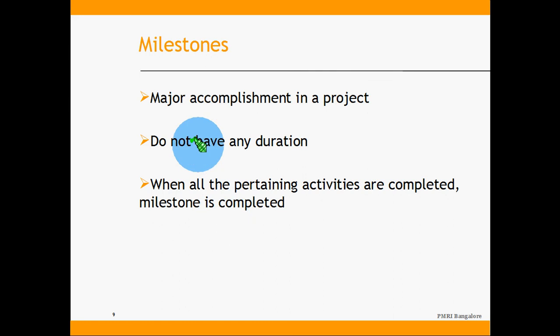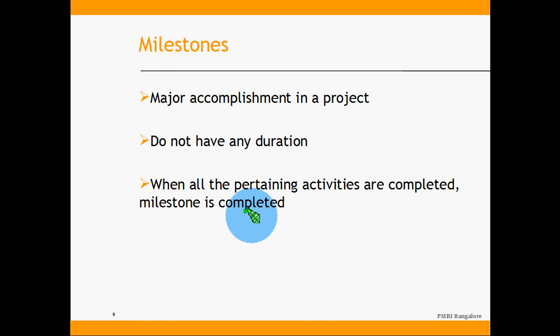This is the 8-80 rule. Milestones are major accomplishments in a project — they do not have any duration. When all the pertaining activities are completed, a milestone is completed. For PMP, achieving the 35 contact hours is a milestone. For a course, completion of the videos, completion of the reference material, and completion of the online test are all milestones.